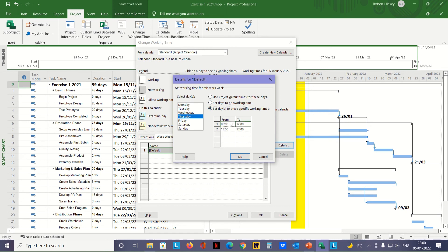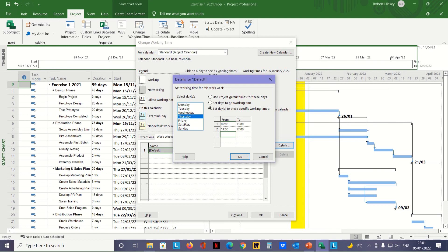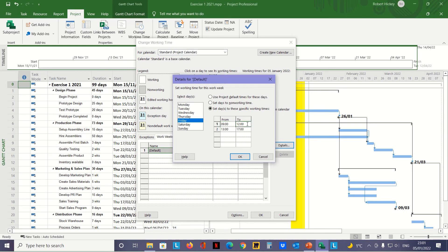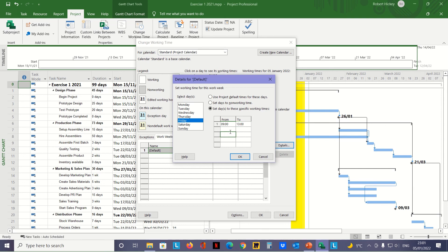Now on Friday, we're going to do something a little different. Select the radio button at the bottom again. We'll start at 9, hit enter, and then up to 13:00 or 1 o'clock. But we're going to give everyone a half-day on Friday. I'll hold the cursor over number 2 for the second half of the day, left-click to select it, and hit delete on the keyboard. That gets rid of the afternoon session. Click OK.